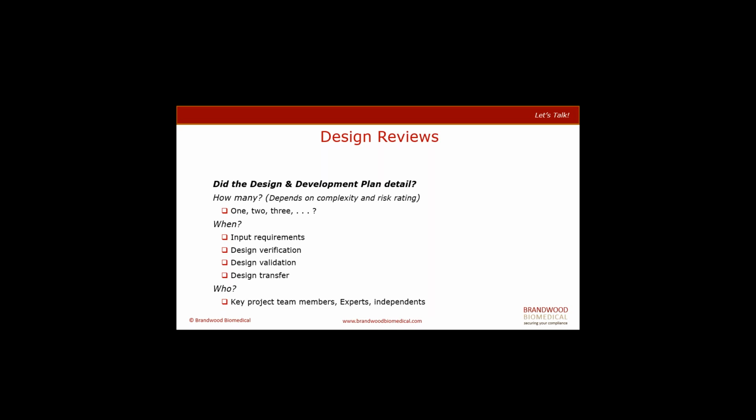And who should be involved? Obviously the key project team members, any experts, and also at least one independent person, so that you have a fresh set of eyes looking over the particular review at that point.